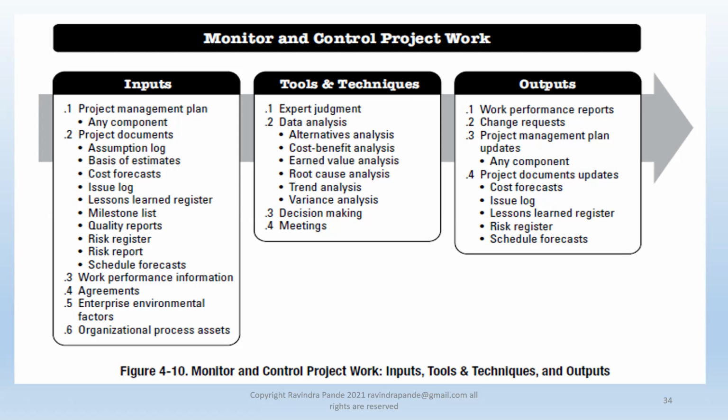In terms of change requests, these are detrimental to whatever planning you have achieved. So in a given sprint, let's say you have a week sprint. In a week there are 5 working days, and if you have 10 resources working with you, and there are, let's say, 5 change requests with, let's say, 2 hours each, the overall load on the workforce is quite